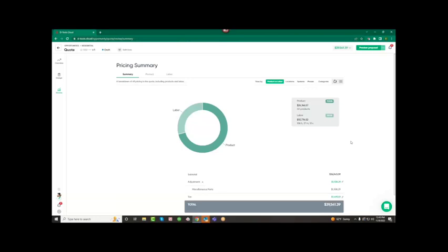And so this 35%, if we get there, that means we're going to have more hours, more time, more labor dollars, which will equate to a better profit margin. See, D-Tools is fantastic, but right now for labor profit, it's relying on you to set the right number of hours and the right margin, right? So in this case, what we'd like to do, and Chanel is going to demonstrate this, is get closer to a 35% mix, which means we need more labor, right? So she's going to show us how to quickly add more labor globally in this job.